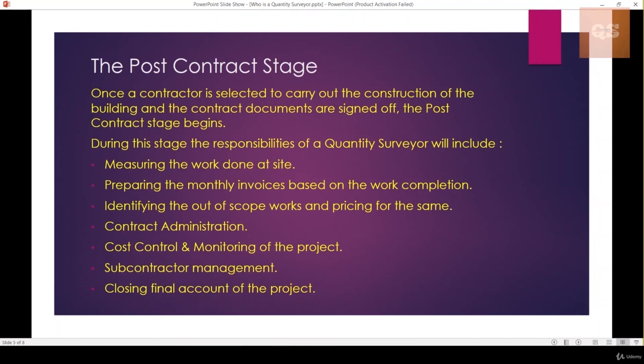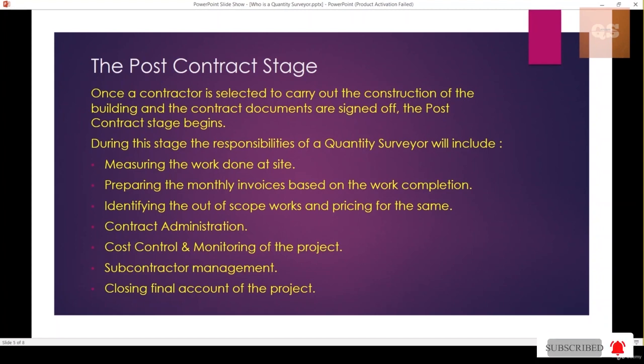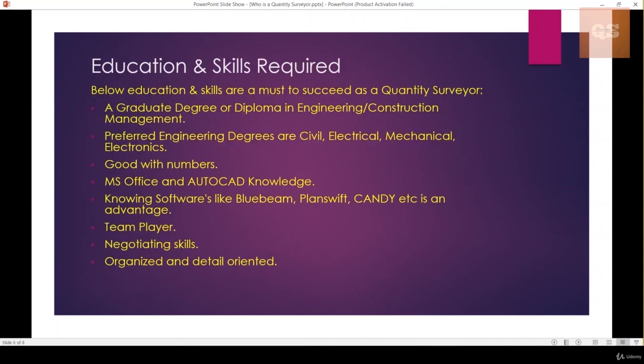They also need to carry out contract administration works, and cost control and monitoring of the project. The contractor might give some work to subcontractors, so the Quantity Surveyor is responsible for subcontractor management. Finally, once the project is completed, they prepare the final account and submit it to completely close out the project.